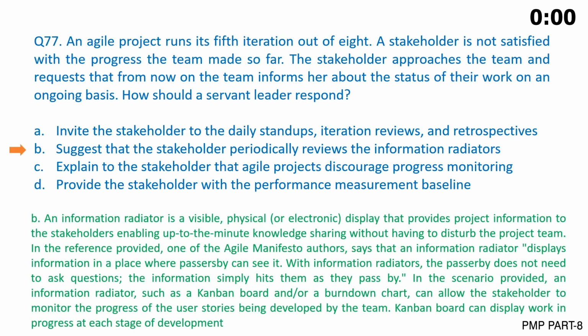The correct answer is B. An information radiator is a visible, physical, or electronic display that provides project information to the stakeholders, enabling up-to-the-minute knowledge sharing without having to disturb the project team.